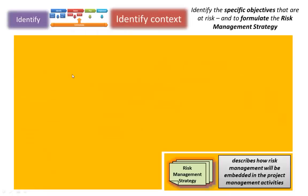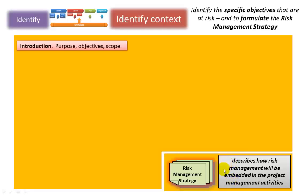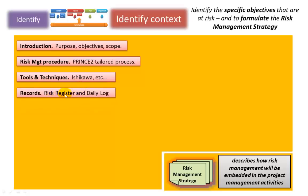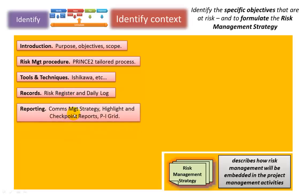Let's go through these in detail, starting with the identify step — identify context. What we're doing here is identifying the specific objectives that are at risk and formulating the risk management strategy. This document describes how risk management will be embedded in the project management activities. Looking at the risk management strategy, it starts with the introduction, purpose, objectives and scope, the PRINCE2 procedure being used and tailored for this particular project, and any particular tools and techniques to be used. The records will be the risk register and the daily log, which is used throughout the project if any risks need to be managed informally rather than transferring them to the risk register.